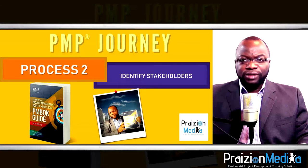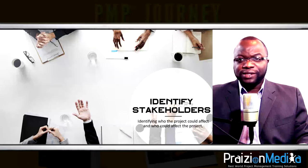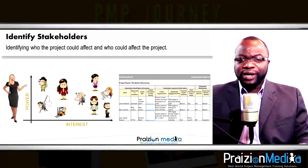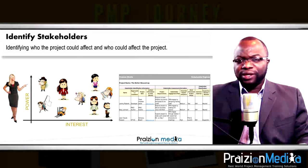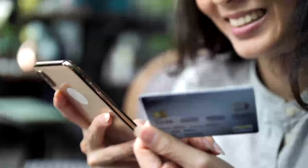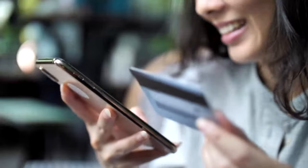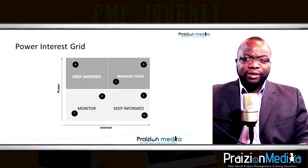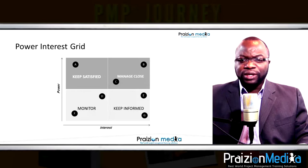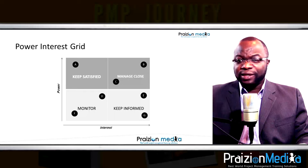Process 2: Identify stakeholders. In the identify stakeholders process, the project manager carries out a stakeholder analysis to better understand the stakeholders — their level of influence, their level of impact, those that have a high or low level of power, those with high or low interest. This is where the PM begins to identify these stakeholders and their needs.